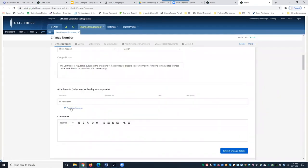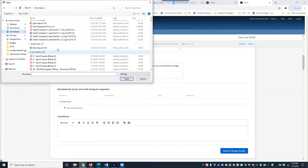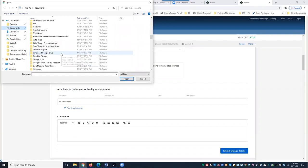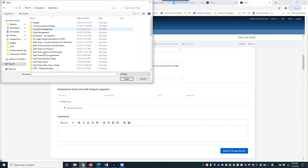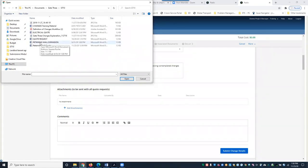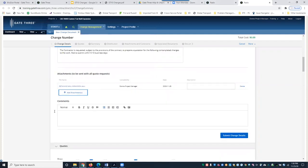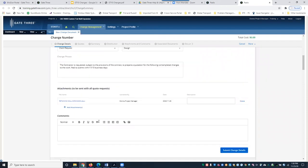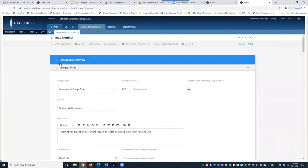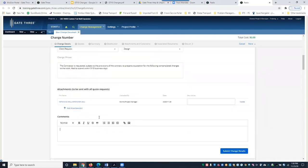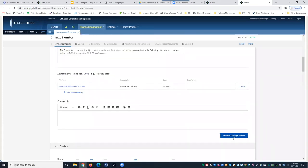If you have any attachments to add at this point, you can do that here — just keep in mind that any attachments added here will be sent with all quote requests. You can also add any additional comments. Once you've entered all the change details, you'll come down and click Submit Change Details.